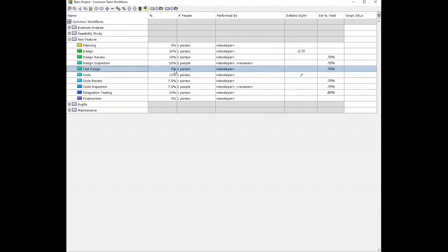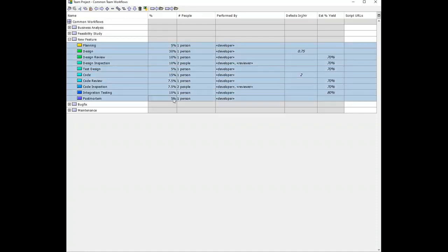Realistically speaking, what happens is that the dashboard or the WBS uses whatever numbers you put in this column basically as weights. So it does its own sum, figures out what they add up to, and then distributes a time estimate based on these weights. So if you didn't add up to 100, it's not a problem at all. It just corrects it so that it silently adds up to 100 in the background on your behalf.